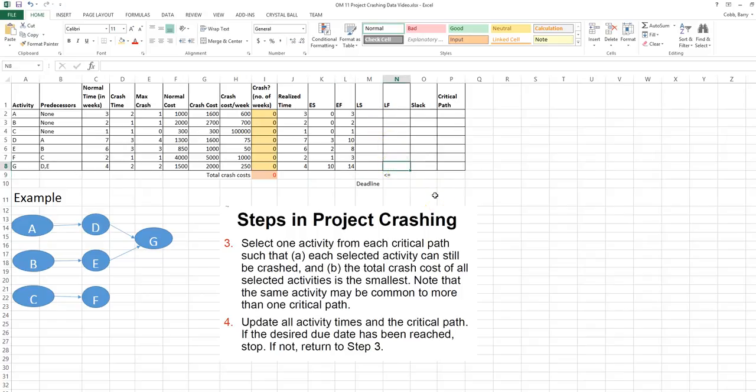In this project, we have 2 activities that have no successors. These are the completion activities. The late finish time for these, which are G and F, is the maximum of the early finish time for all the activities.